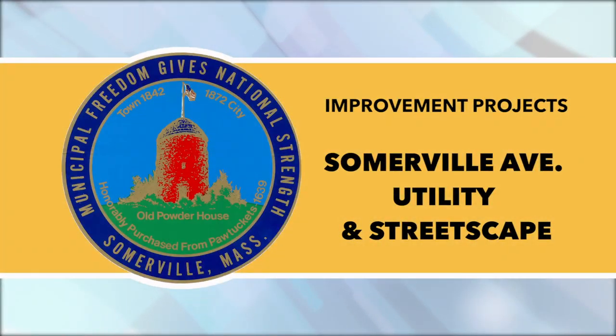Somerville Ave utility and streetscape improvements. In Union Square, crews have been installing granite curbing, infrastructure for street lighting and traffic signals, and a concrete foundation for a mast arm, which will cure over the next few weeks. During the week of January 6th, box culvert drainage installation will continue on Somerville Ave from Merriam Street toward Rossmore Street.